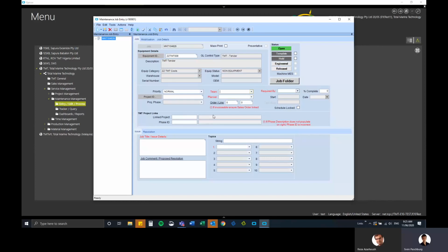But again, you can, for example, have a job started. It wasn't initially part of the project, but now we want to include this job in the project. Then yes, you can ask the planners to link it retrospectively, and then it will be included in the project costs, as long as, for example, you haven't yet closed it and you haven't yet invoiced against it separately, right?